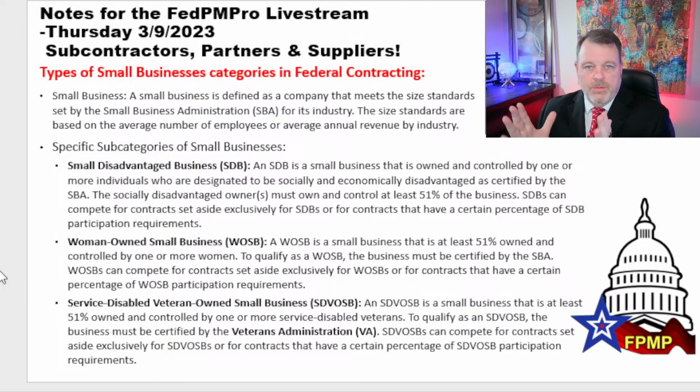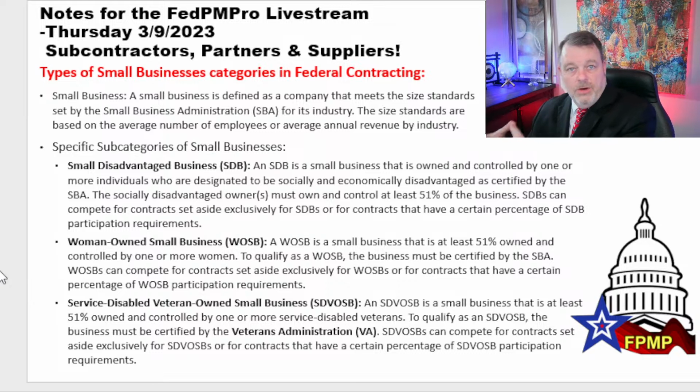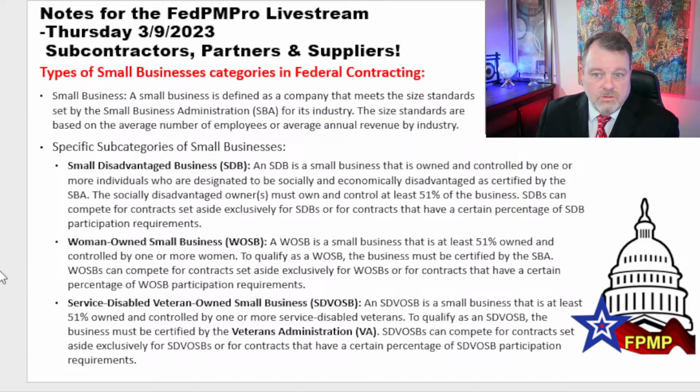And it might say full and open, or delivery by the prime or large business can be 90%. And then we need 5% SDB, and then 5% WOSB. And in that situation, you need to know, is that revenue? Is it people? And you need to make sure that you're delivering that 5% from small businesses that have the small disadvantaged business designation, right? And they're delivering that to the contract and through the contract to the customer. So this is why it's so serious to know these things and make sure that you're checking these boxes.